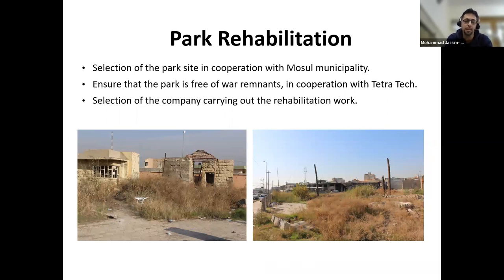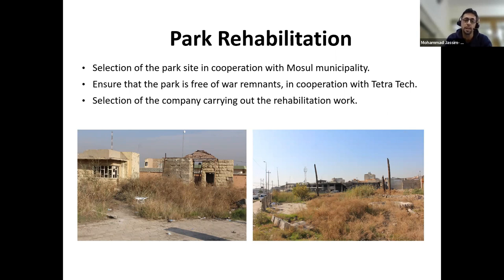Regarding the second part of the project — the rehabilitation of the park — the target area was to become a safe and recreational area. The first phase was selection of the park site in cooperation with the Mosul municipality. The second phase ensured the park was free of explosive remnants in cooperation with Tetra Tech, who made a technical survey of the location. The third phase was selection of a contracting company. These three phases — which we expected to take perhaps 10 to 20 days — actually consumed more than four months.